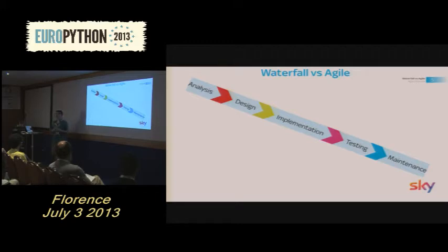Then our development can begin, only once we've got our requirements and our design. Let's say development takes 2 months. And then we've got a month of testing. The problem here is that now 5 months down the line, this is when our client receives our product. And then we've got a constant maintenance cycle. But 5 months of time has gone past in this project.